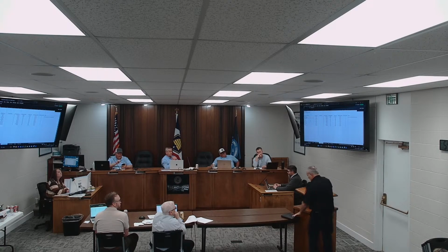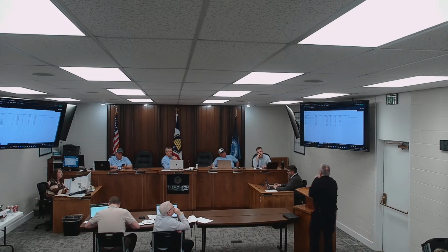I think we were going to guesstimate the cost for 32 at about 350, so it's going to go up about $50,000. But we've still got that 2 to 3 year build time. So if we get approval to do another one for the 25, 26 budget, we're still 24 to 36 months out from receiving it.